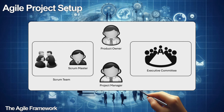Agile projects set up in an SAP S/4HANA implementation may vary based on a number of factors, including the size and scope of the implementation, project budget, resource availability, geographical presence of business users, political scenario at the client's locations, and many other factors. A Minimum Viable Product (MVP) is a concept based on the fact that clients may want to include only the must-have features in the initial release. This concept is very useful in SAP S/4HANA implementations because of the tightly integrated nature of the implementation, in which integration requirements will become must-have in the second and subsequent releases.